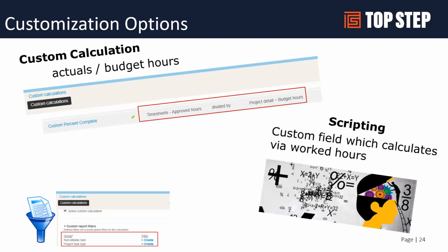So what we've done in that scenario is some scripting where we will actually script a percent complete calc based on tasks that are marked as fixed fee, generally using task types. And so we're looking at the hours entered against those fixed fee tasks, the planned or estimated hours or the bookings against those fixed fee tasks. And we're calculating a percent complete, and then we're storing it in a custom field on the project properties.